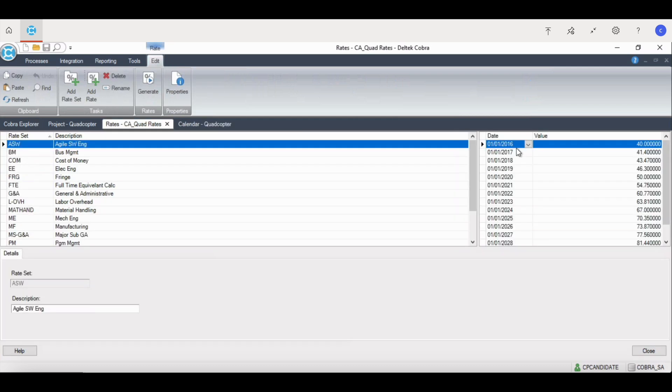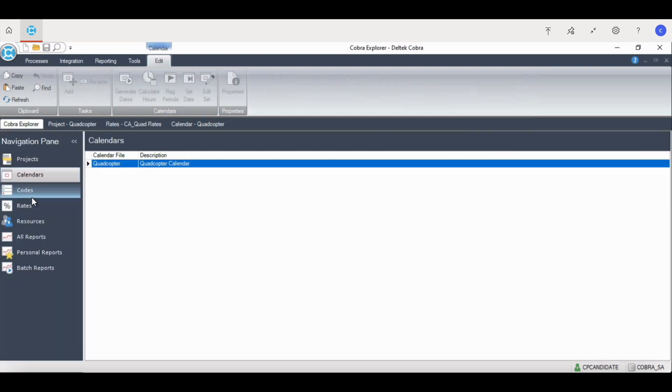After the calendar is created, the rate file is the next ancillary file to be created because each of these resources uses the calendar periods for any rate escalations.